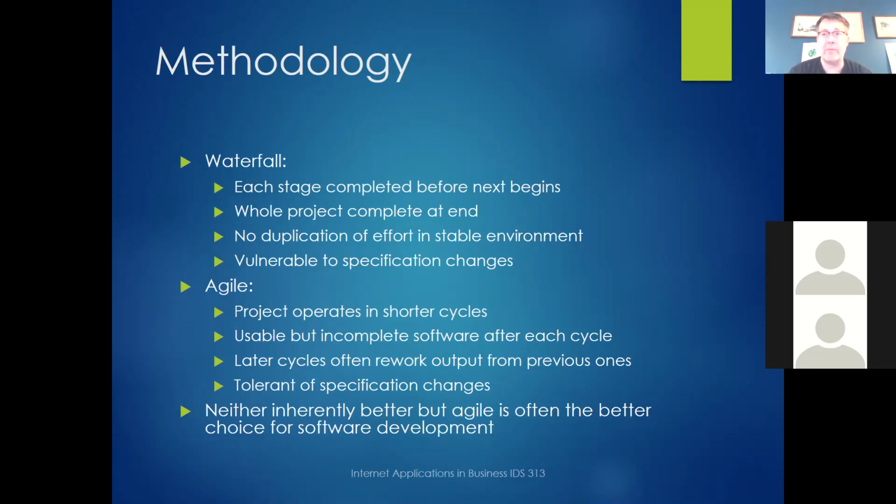Likewise, as you're coding it, there may be some major system vulnerability. So you have to change how it's going to be deployed. And you say, oh, well, that means we're going to have to code it in a different way. And you have to go back and rework that. And then maybe once you've released it for testing, your test people say, hey, there are some key features here that are not working the way they're supposed to. So you have to go back to the coding stage and fix that, or maybe even back to the planning stage. It can be a big problem. So that's the issue with waterfall.